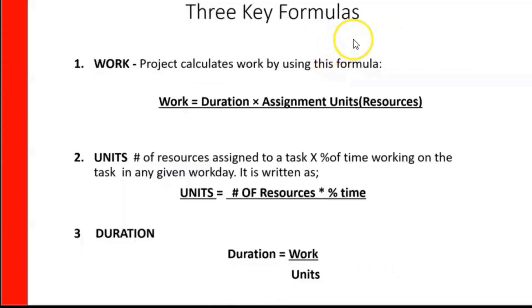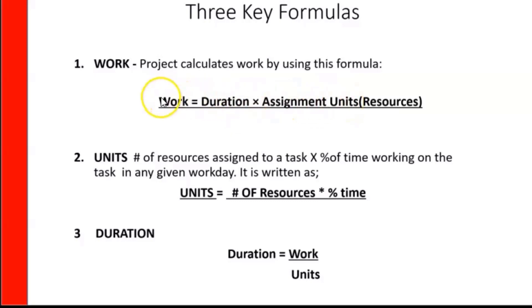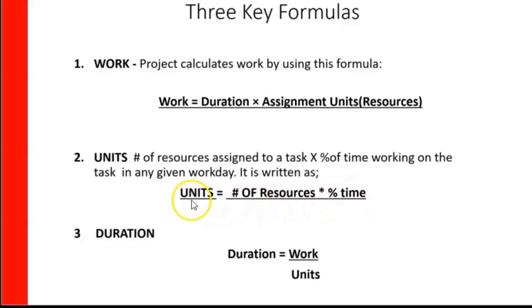There are three key formulas you have to learn when using MS Project. The first is work: Work equals Duration multiplied by Assignment Units. So if your duration is one day and you have one person assigned 100% of the time, your work is going to be eight hours — one day by eight hours. Units equals number of resources by percentage of time, so one resource at 100% gives 100% units. Duration equals Work divided by Units — if your work is eight hours and your units are 100%, the duration is going to be one day.